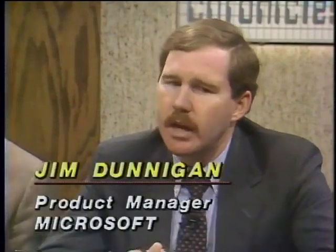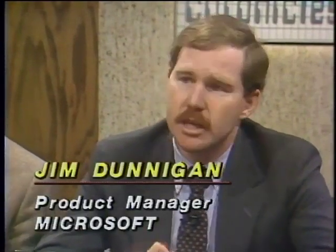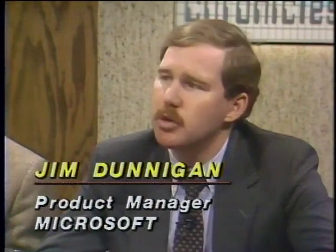Okay, it's different in a couple of ways. One thing that we take into account is with resources, we have individual resource calendars. So if you have a particular resource, let's say, for example, that is going to be on vacation for 2 weeks, or it could be a piece of machinery that's going to be unavailable for several weeks, you can actually go in and block that time out on their particular calendar, and when the scheduling takes place, it will take into account the availability of those individual resources.